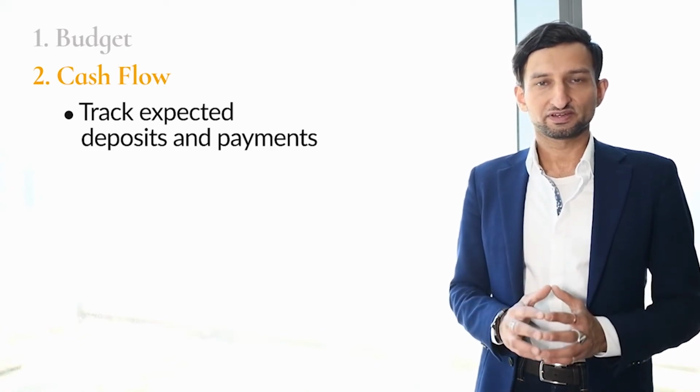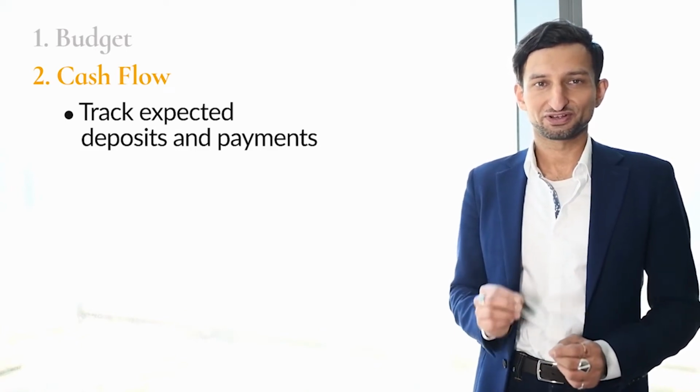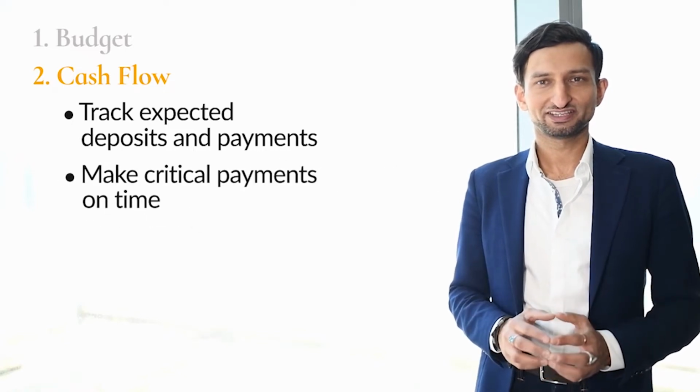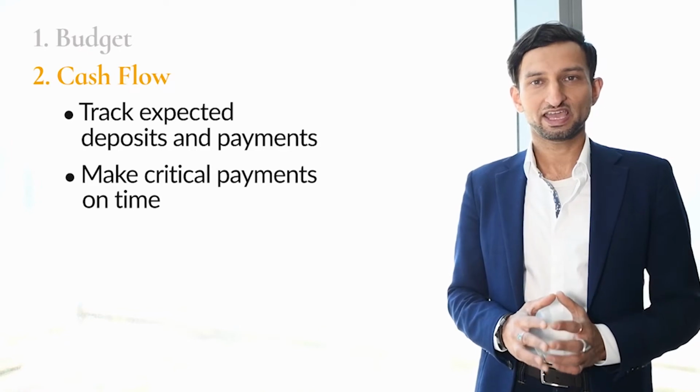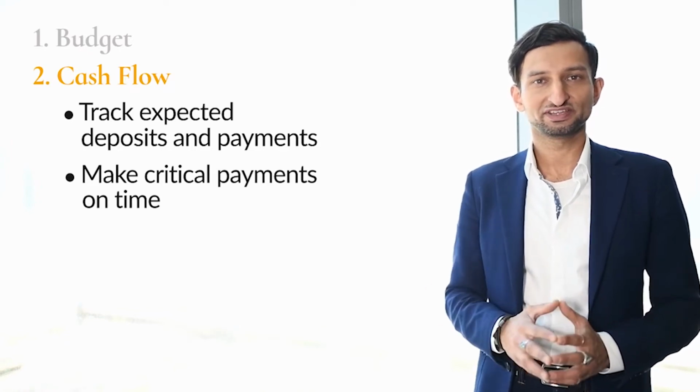Cash flow is important because it ties right into your overall project schedule and critical path. To be stuck waiting for a payment or an important deposit can hamper your schedule in very critical ways.